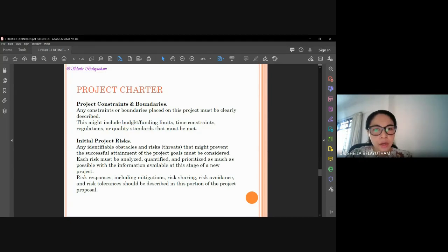So once you identify the potential effect, your risk comes into the picture, because these are elements that give you risk to the project execution. But what if we already have this, so what? What will happen if there are certain regulations? For example, the land is probably agricultural land and we want to change it into manufacturing. What is the risk if we cannot change the land title? So what would happen? Those are the things that you need to think of.